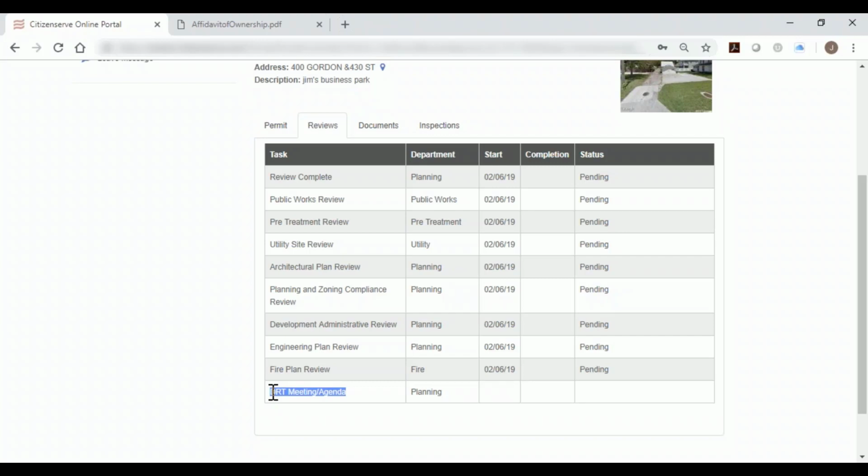Okay, go ahead, Jim. Ray is correct. This particular workflow is set up so it's going in parallel to all these folks, and for each step in the process, we can configure a number of days for the due date. So one person we might expect a turnaround time of 1 day, and somebody else we might give 2 weeks, and it just helps you manage your overdue activities.